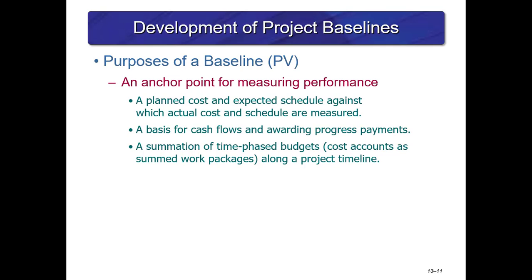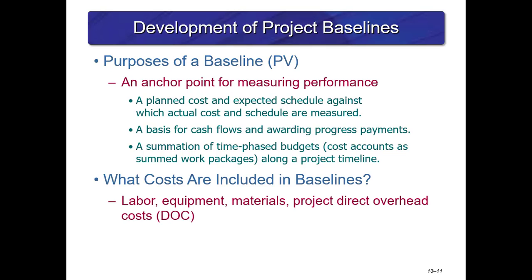The purposes of a baseline include that it is an anchor point for measuring performance, plan cost and expected schedule against which actual cost and schedule are measured. It's a basis for cash flows and awarding progress payments, and it's a summation of time-phased budgets. The costs that are included in baselines are labor, equipment, materials, and project direct overhead costs, which are called DOC, direct overhead costs.